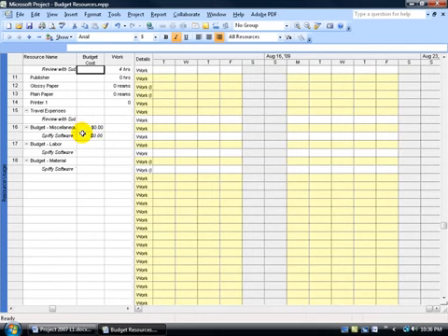This will signify or let you know that you can only enter in the budget cost column here just for the budget cost resource that's assigned to the project summary task. Okay, let's go ahead and insert the budget work.